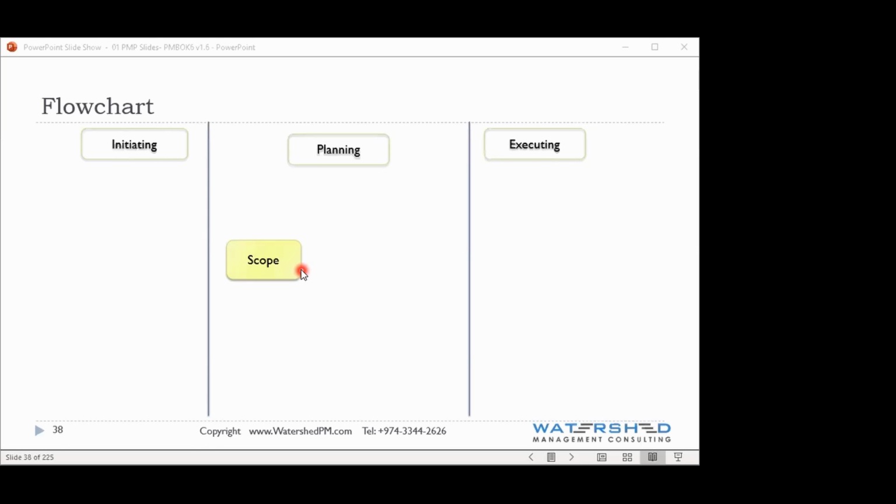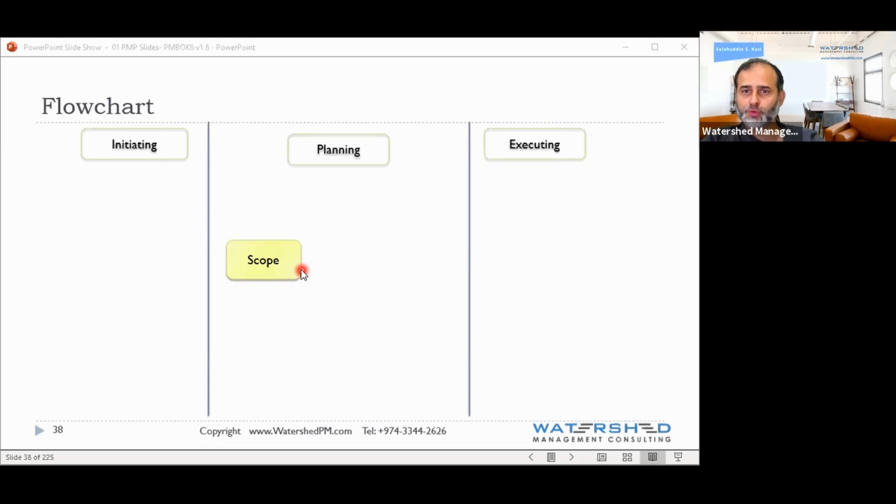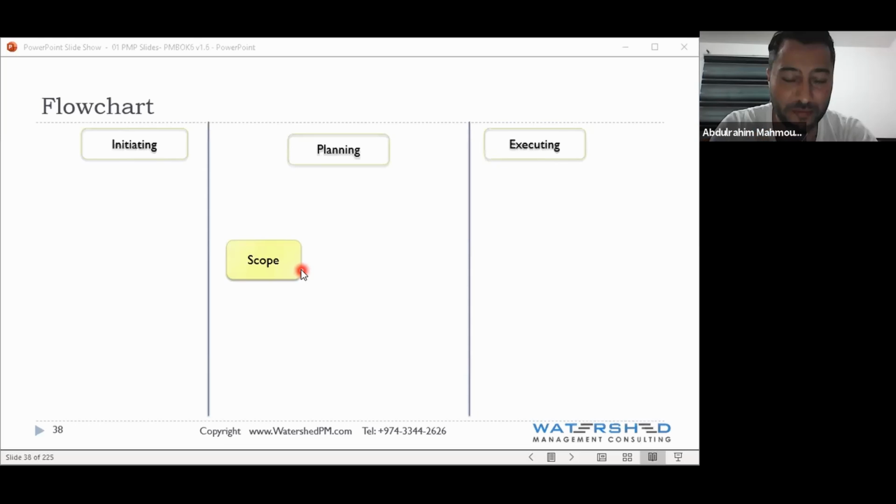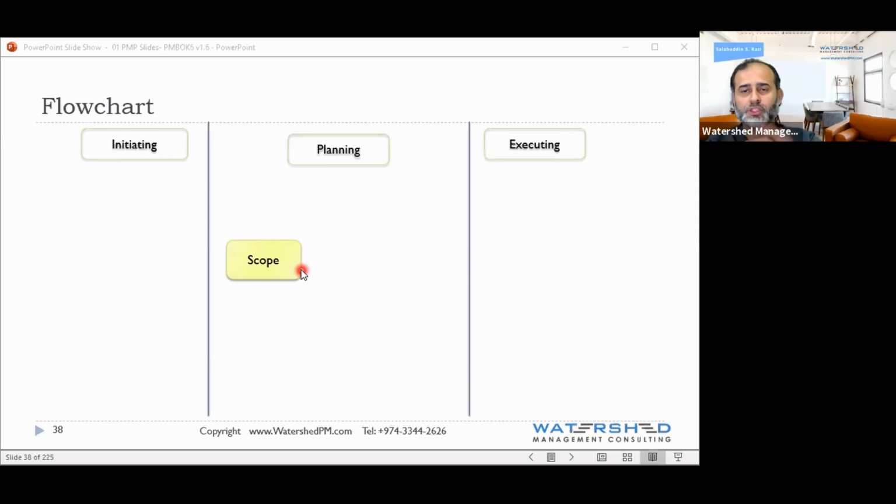Schedule? No, okay. Let's say you finish your schedule. What are the things that you do in your schedule? Don't you sometimes make some duration long, and some duration short? Sometimes, to make the project complete in time, you go and add resources. Possible? Yeah. So schedule cannot be last, because while you're doing your schedule, it's possible you will add resources. So schedule is out. How many remaining? 3 remaining.